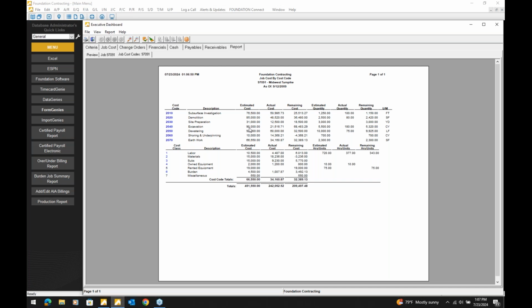This allows me to drill into jobs, drill into line items on that job, and see exactly where every line item of cost is. Now I can compare budget versus actual. I can see what's left out there as far as a variance or remaining cost. It allows me to track estimated hours versus actual hours. And if I ever want to see what's behind the curtain, or how we used 377 hours, or why I'm over budget on certain categories, I can drill into each line item as well.